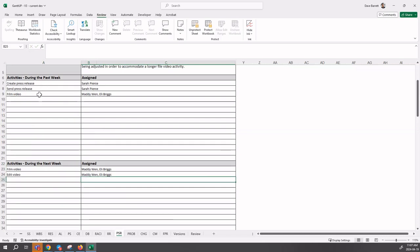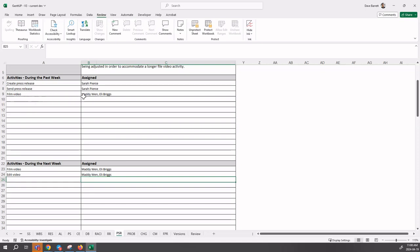Now you have a snapshot of what did you do in the past week, and what are you planning to do next week. That's the purpose of these two sections. Note that you can have the same activity in both parts if they're if that's what you're planning to do. That means this one is incomplete - it will not be completed. Film video is still underway next week.